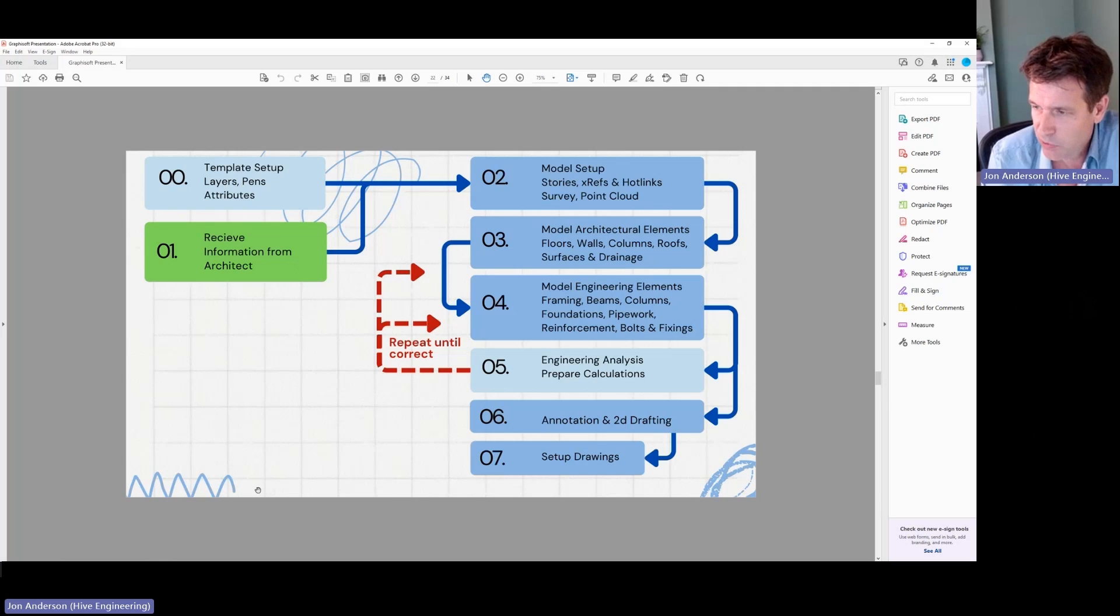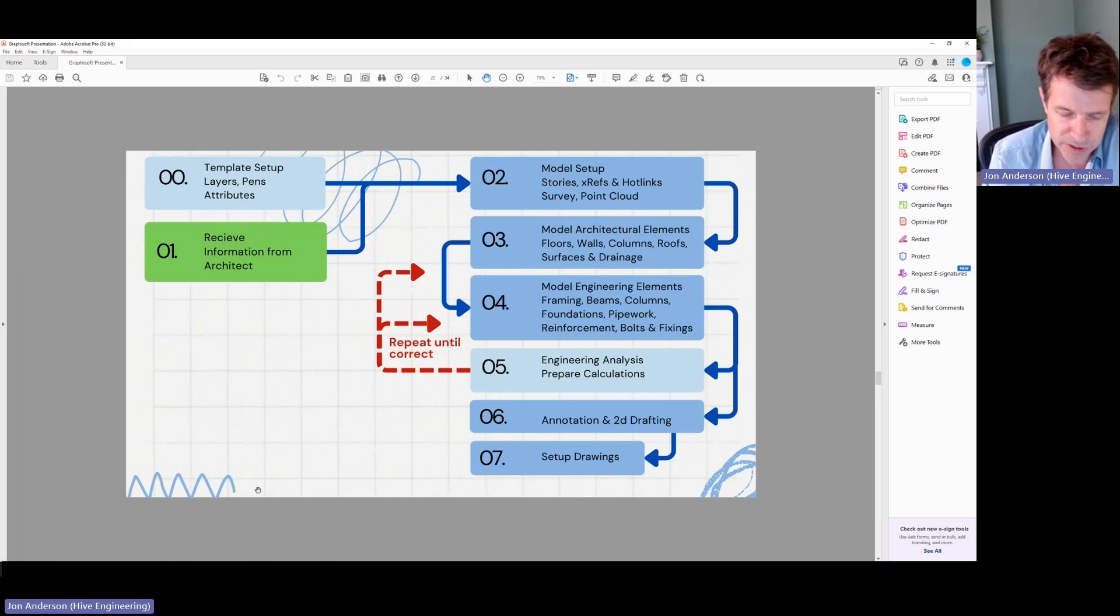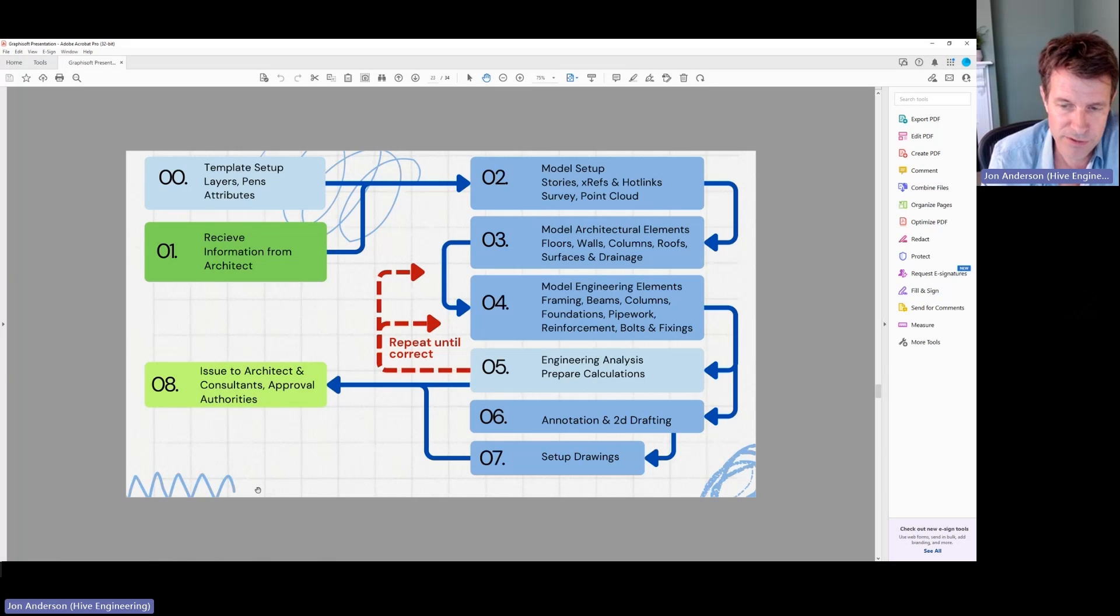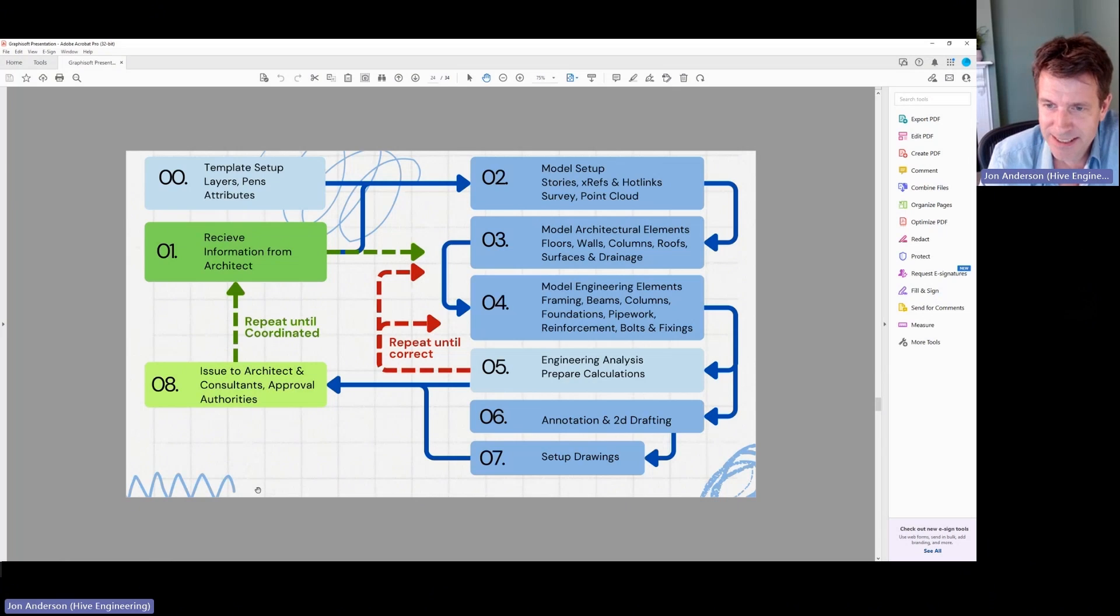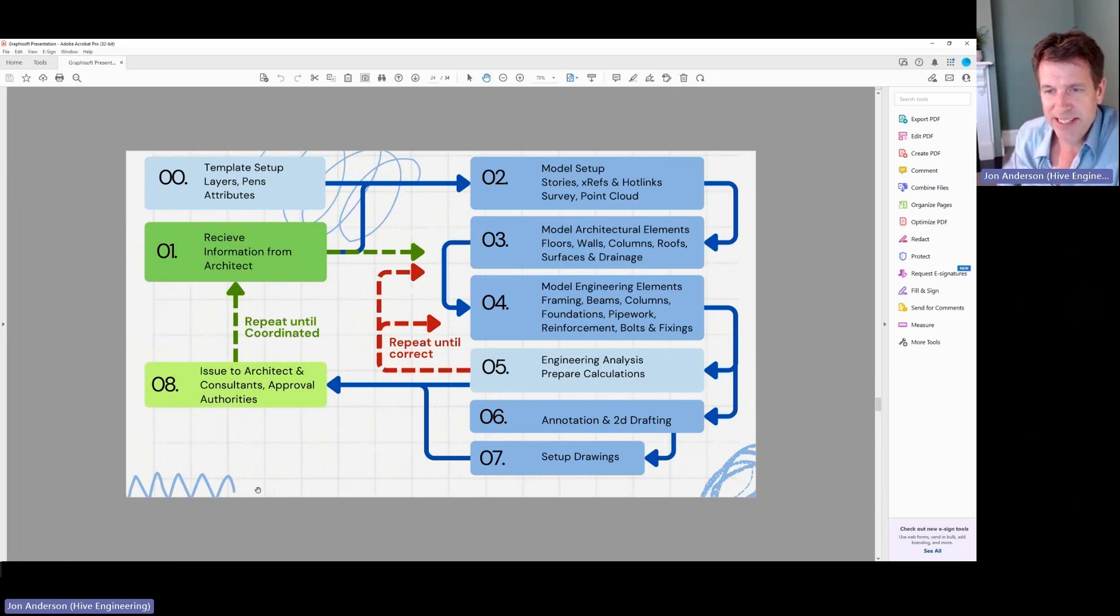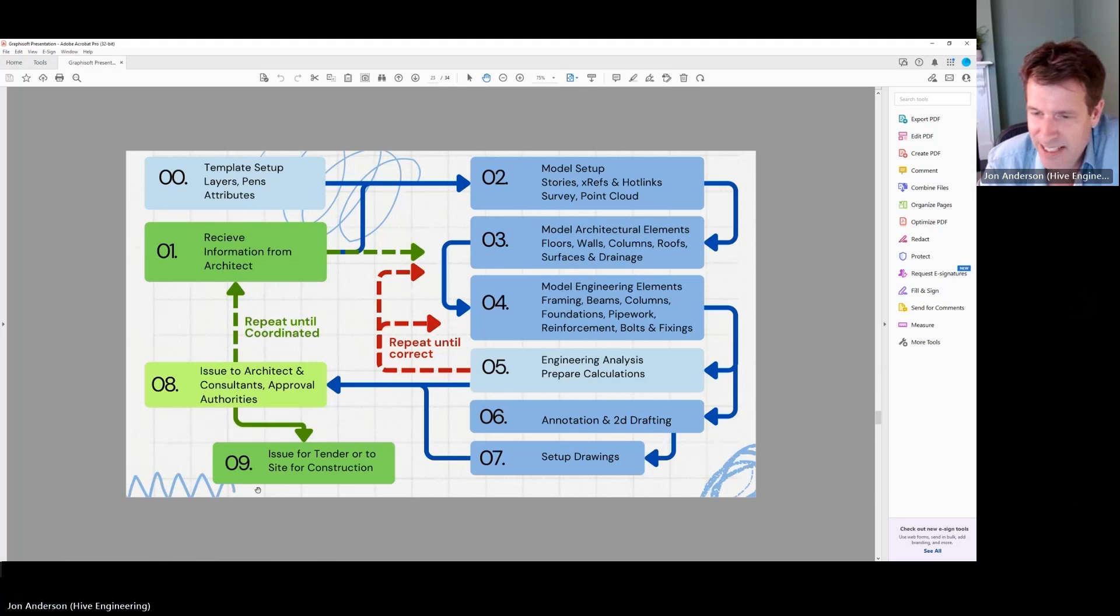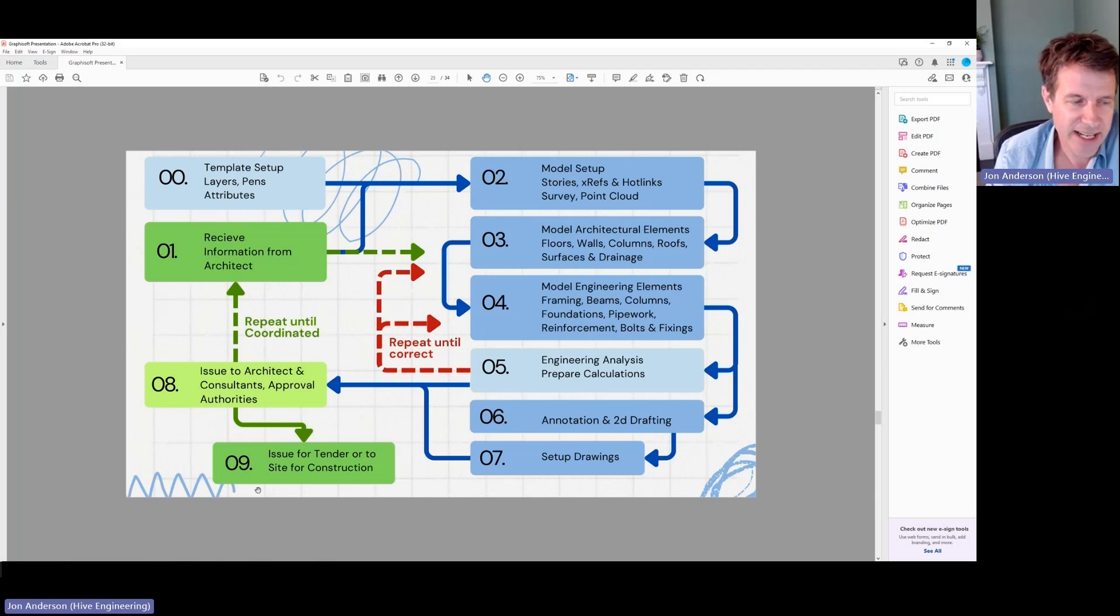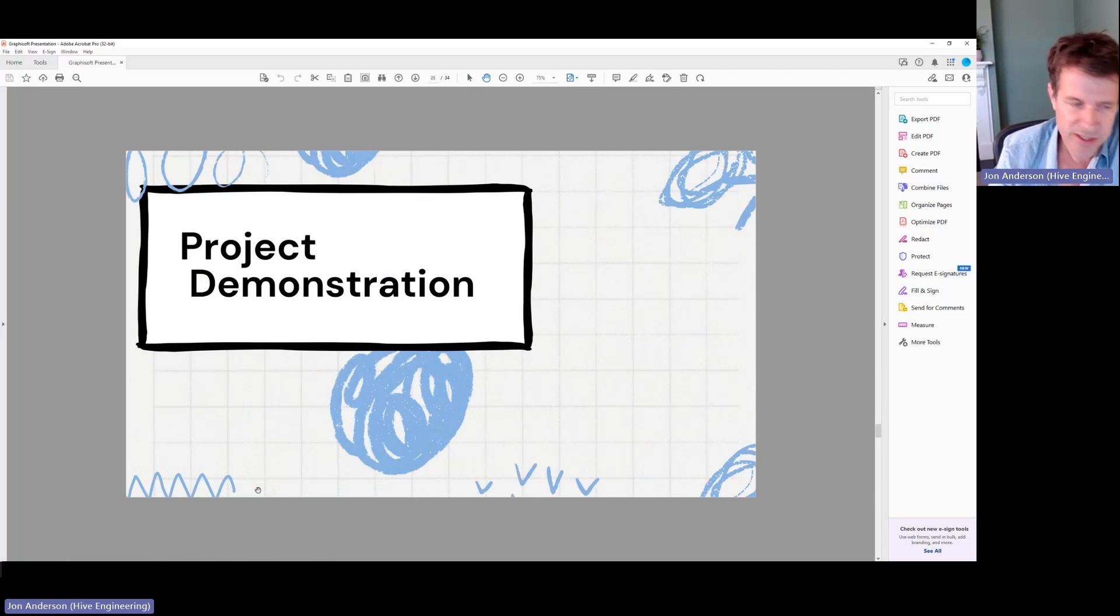And once that's working, I set up like the 2D drafting and annotation and the drawings and then that goes back to the architect for them to review. And then as it is, we go around again, we repeat until that's coordinated to go back through the architect and then finally it'll get issued to site or issued out for tender. So that's typically the process that I use.